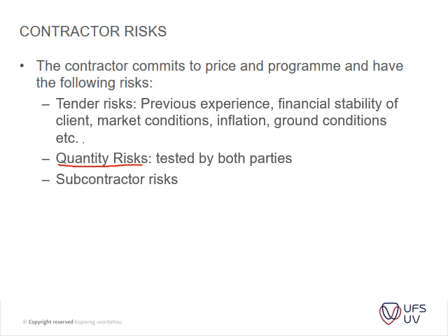And then you have subcontractor risks, guys not producing. And then obviously you have design risks. If the designers didn't look at everything, you may argue that it goes back to the designers, but it still stays a risk for the contractor, because if there was a design mistake, the contractor might still be influenced. For instance, the work has to stop while a design is fixed. So that's where your time is, RFIs and information requests are very important.